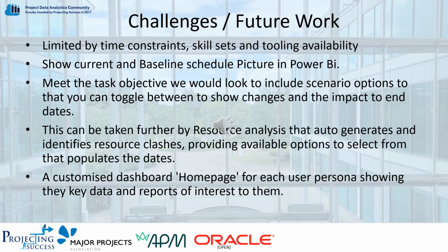During the task, we were limited by the time and skill set constraints in terms of developing a tool. We envisaged a solution that showed a Gantt chart with a baseline and current schedule in Power BI. We would look to include scenario options that give an ability to apply different changes and see the visual impacts of these. This can be developed further by adding resource analysis that auto-generates and identifies resource clashes, which presents a solution with options to select and view. This would have the ability to be customized within a dashboard for each persona to view their key data.